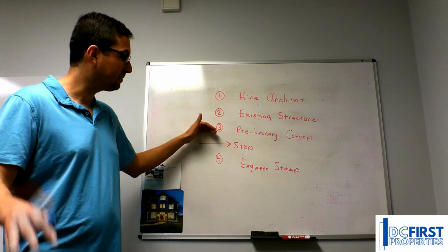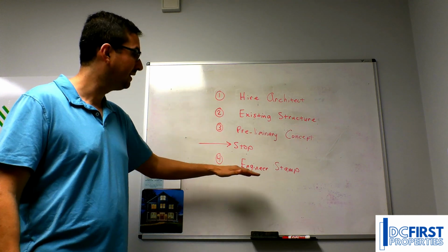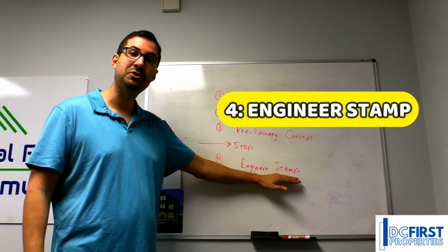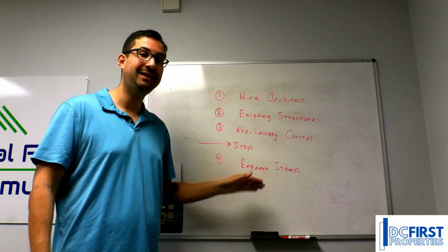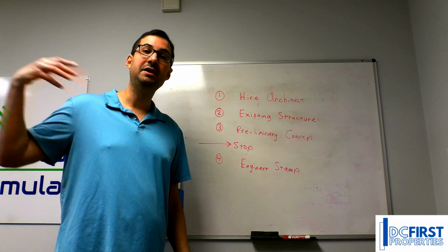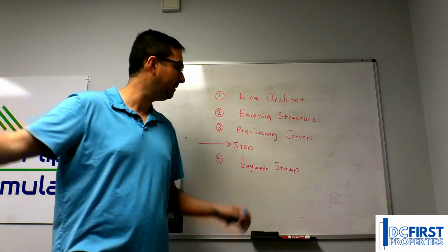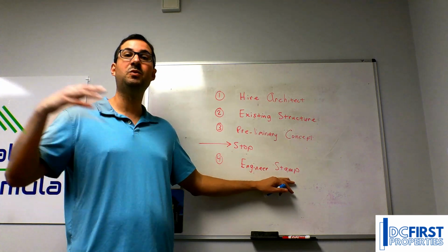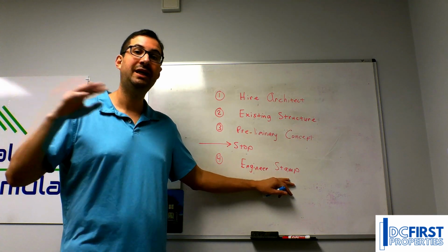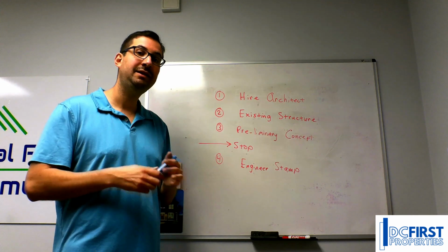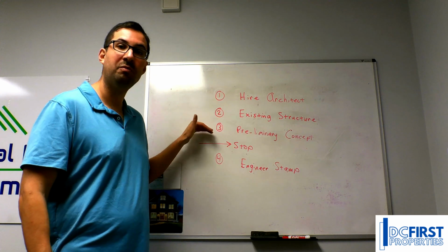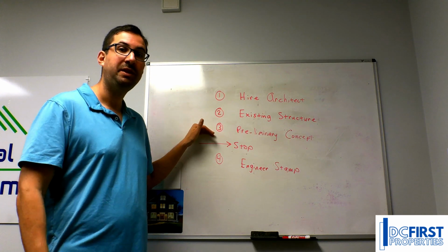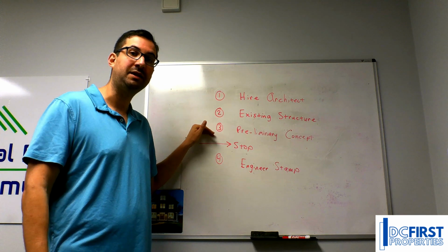If you are experienced and you go further, you get an engineer stamp on the drawing and you submit to permit, now you're locked into the project. If there's unexpected cost along the line that this stamped drawing now costs you more than you thought to build, you're now stuck with it. So I highly encourage you guys, if you're not that experienced, to spend more money up front in the planning phase, because overall it's going to save you money down the line.